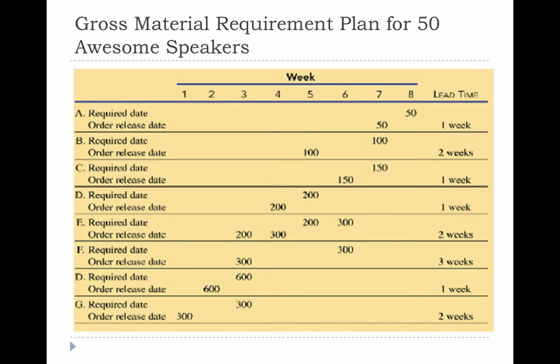Because last time in our discussion, we also added some terms: the lead time and the items in stock, and combining these you come to know the final required items. So if I take you back to the product structure that we already did for the speakers kit, this is the kind of chart you can prepare. This chart is comprehensive, keeping the lead time in mind, and accordingly you would know when to order what.